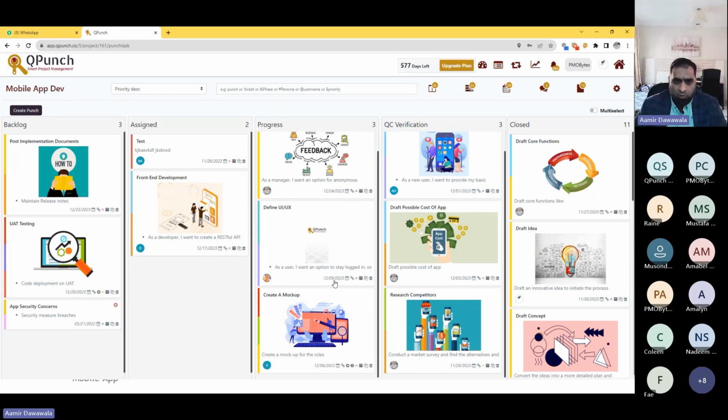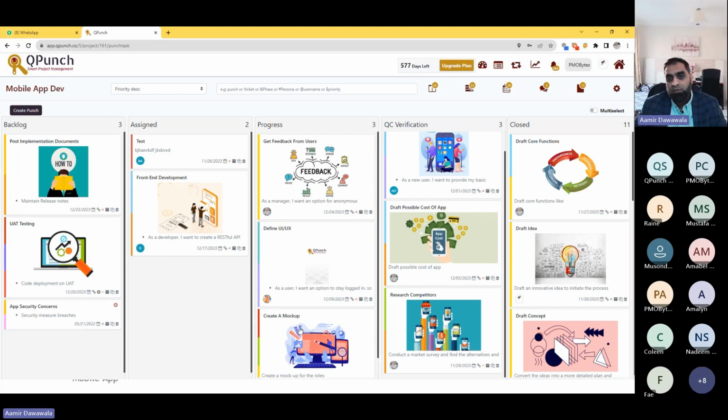One more thing to remember is you try to keep the progress as light as possible. That means you should have a number defined for work in progress as a limit. So if you have defined 3 as a number, that I will keep the work in progress limit to 3, I always ensure that the flow is on and nothing gets stuck more than 3 parts of WIP, which is work in progress. That means constantly I'll try to move everything towards completion.